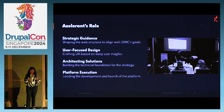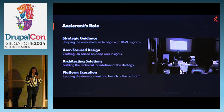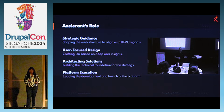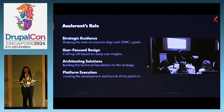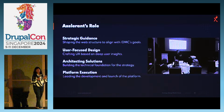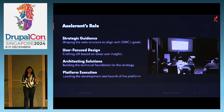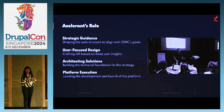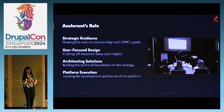We analyzed the existing content data. After analyzing the different types of content, we asked them which one is being used widely and what the impact is. From that, we analyzed which contents we had to migrate first. After getting all that data, we provided the strategy: this is how we are going to work. We are going to work for around 3 months, within around 6 to 7 sprints at the max, of 2 weeks each, and we will ensure that it gets delivered within 3 months.